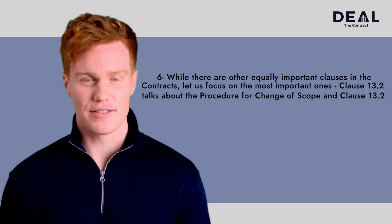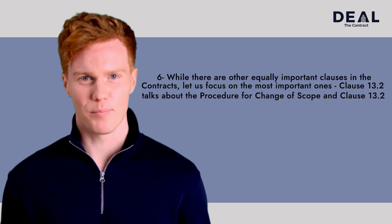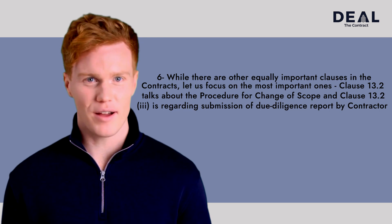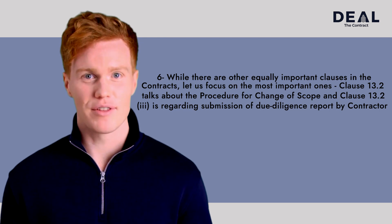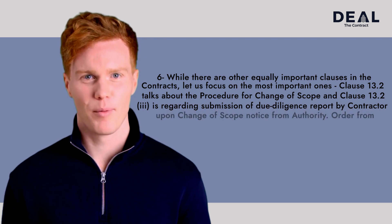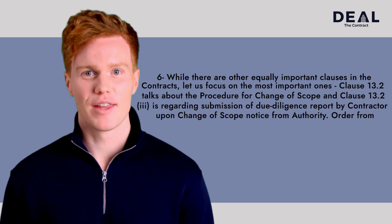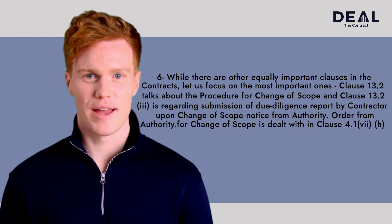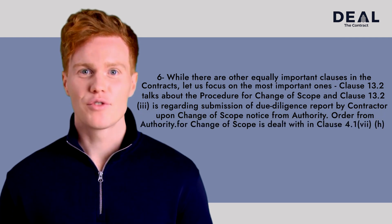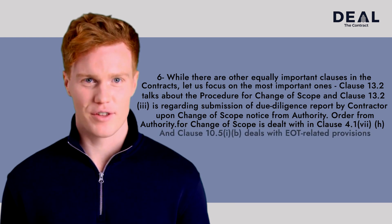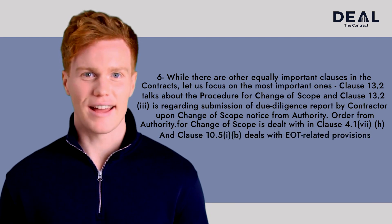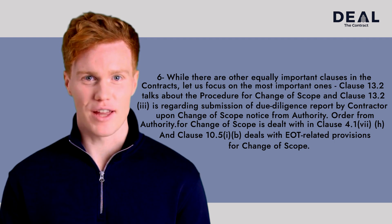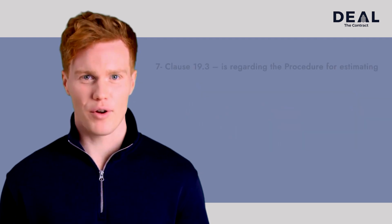While there are other equally important clauses, focusing on the most important ones: Clause 13.2 talks about the procedure for change of scope; Clause 13.2.3 is regarding submission of a due diligence report by the contractor upon a change of scope notice from the authority. Order from the authority for change of scope is dealt with in Clause 4.1.7(h), and Clause 10.5.1(b) deals with the OT-related provisions for change of scope.